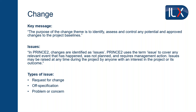Then there are other concerns — problems, things that have happened. Remember: risks are things that may or may not happen, they have uncertainty. Issues are things that have happened and require management action. If legislation has changed unexpectedly, or someone has been off sick — what does that do to your project? It's picking those things up and dealing with them. It's part of the manager's role to ensure these are being managed on a regular basis throughout the life of the project.